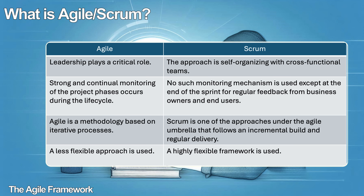There are four notable differences between Scrum and Agile. Firstly, for Agile, leadership plays a critical role, whereas in Scrum the approach is self-organizing with cross-functional teams. Secondly, with Agile there is strong and continual monitoring of the project phases throughout the lifecycle, whereas for Scrum no such monitoring mechanism is used — the only exception being at the end of the sprint for feedback to the business and end users. Thirdly, the Agile methodology is based on an iterative approach whereas Scrum follows an incremental build. Lastly, Agile embodies a less flexible approach compared to Scrum, which is a highly flexible framework.